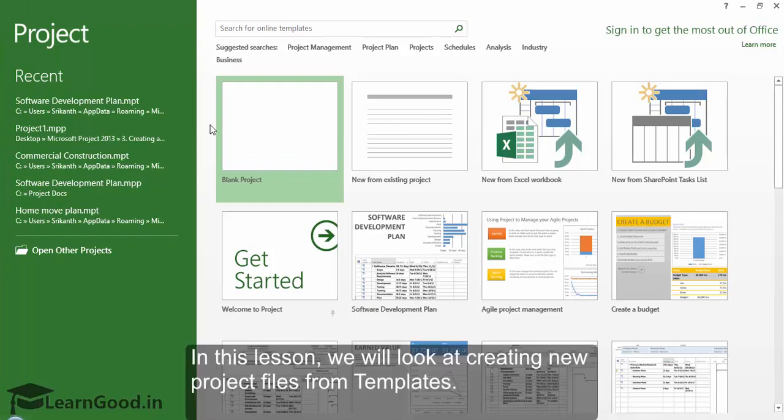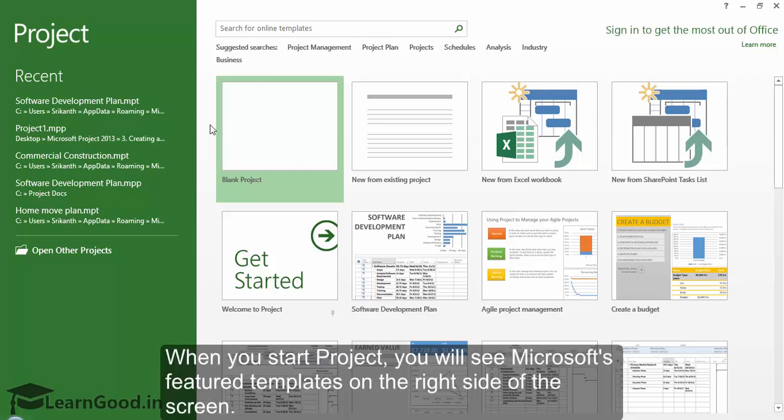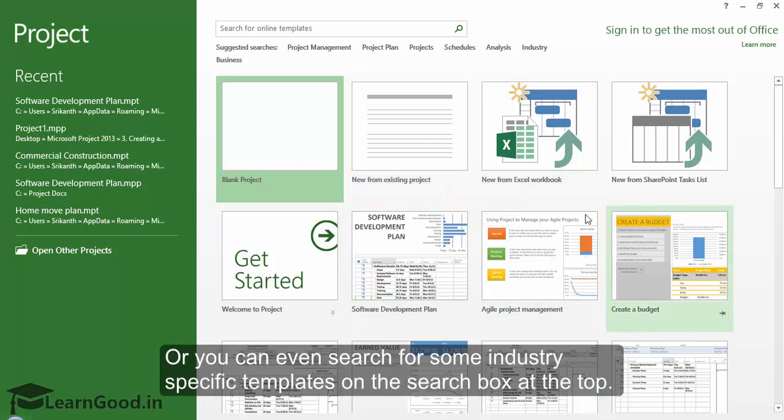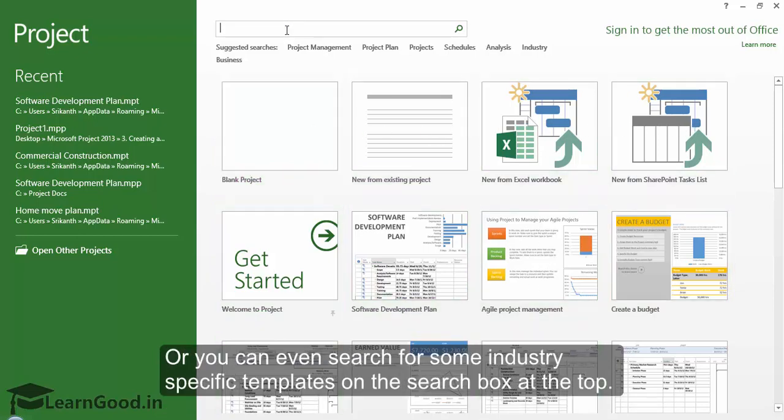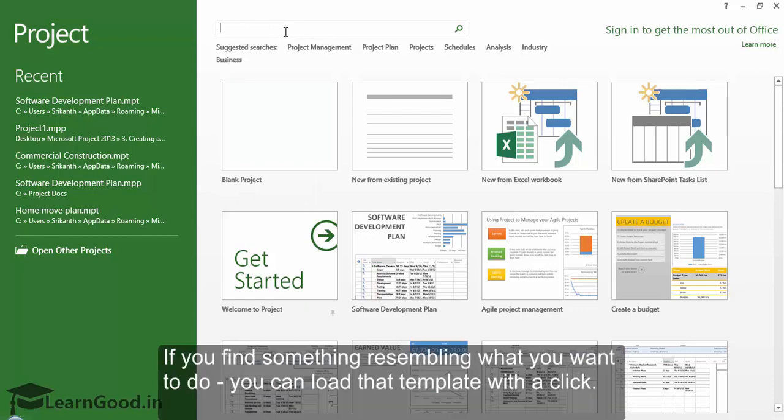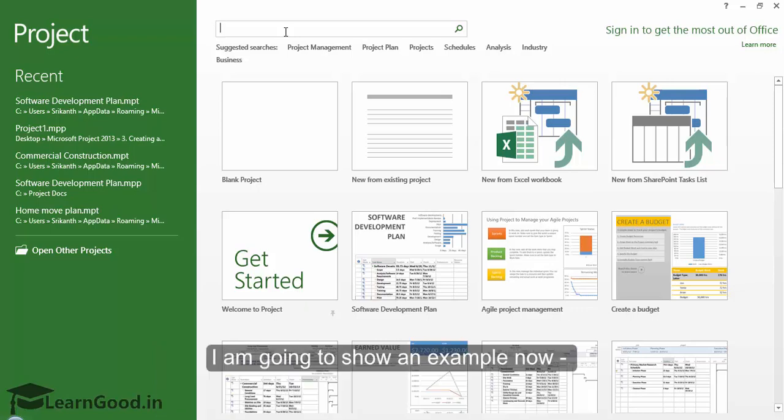In this lesson we will look at creating new project files from templates. When you start Project, you will see Microsoft's feature templates on the right side of the screen, or you can search for some industry-specific templates in the search box at the top. If you find something resembling what you want, you can load that template with a click.